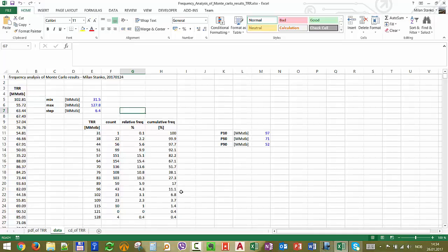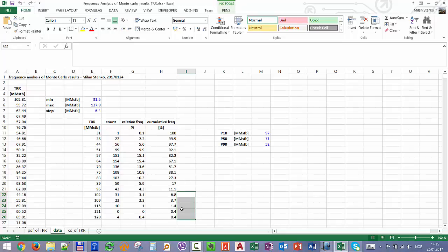So if I sum all of them, I'm taking the probability from that number up, because I'm summing all the probabilities of the numbers that are higher than that number. When I say P50, I'm sure that the value is at least that number or higher.